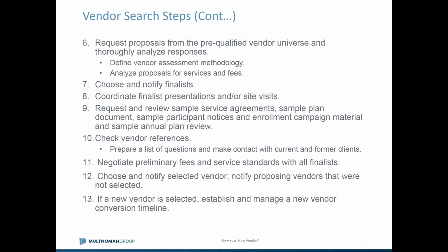Once you get back the responses, it's important to assess the proposals. This is certainly an area that we as consultants spend a lot of time on. The responses typically can be 70 to 100 pages of written questions and answers about the capabilities of a vendor, plus a few hundred pages of supplemental materials. So the materials that come back are pretty daunting to analyze,